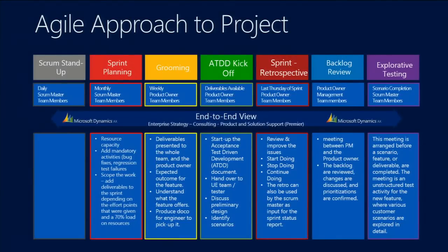The other important thing is that if you put in 3 CRPs as an example, what we see quite often is when projects run late, without any engineering behind it, oh, we're going to move the date out 3 months. And then they're 2 months in, and they go, oh, we're going to move the date out another 2 months. It's a recurring pattern. In the CRP-based approach, it's actually much more straightforward because I can say, this is the amount of work that I have left. I'd add another CRP in.